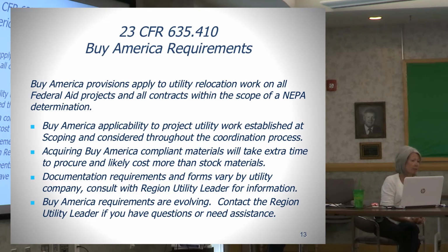Acquiring Buy America compliant materials frequently takes longer to procure and costs more than non-Buy America compliant materials. So that needs to be taken into consideration when you're planning the timeline of your projects.